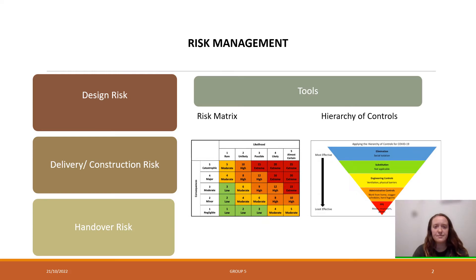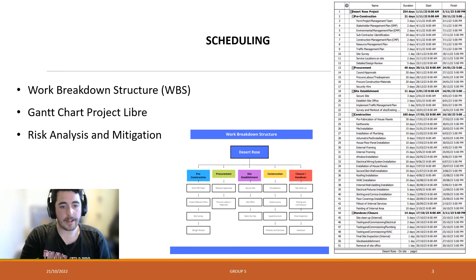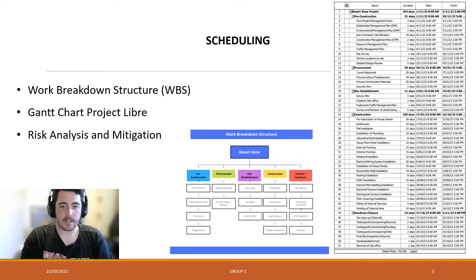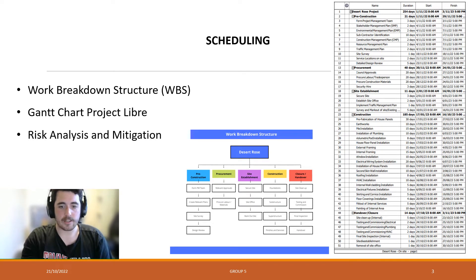We now move on to the scheduling breakdown. Accurate estimation of project scheduling is essential to carrying out a successful project. A work breakdown structure was used to get the key tasks and relevant subtasks for the project at each stage. This was further broken down into more accurate tasks with task duration, start and finish date, and predecessor tasks analysed. This was done in the ProjectLibre software and allowed for a Gantt chart to be produced showing the critical path. A scheduling risk analysis was performed, which is necessary in order to account for and mitigate possible scheduling delays and errors.